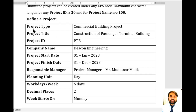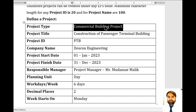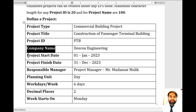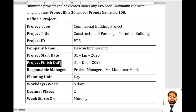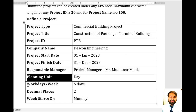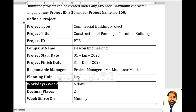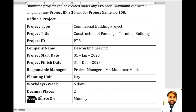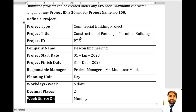First of all you need the project type — like commercial buildings. Next, the project title and project ID, company name, project start date, project finish date, responsible manager, planning unit, work days per week (calendar settings), decimal places, currency settings, and week starts on. These are the information you require before starting a new project file.